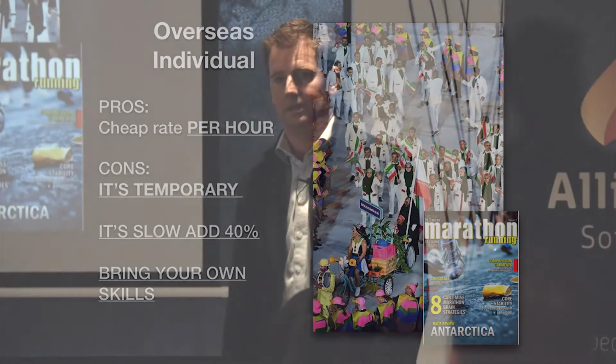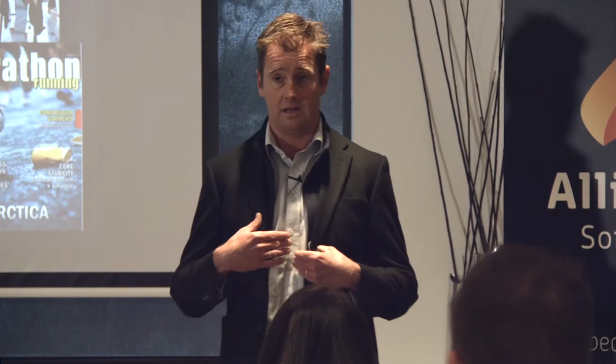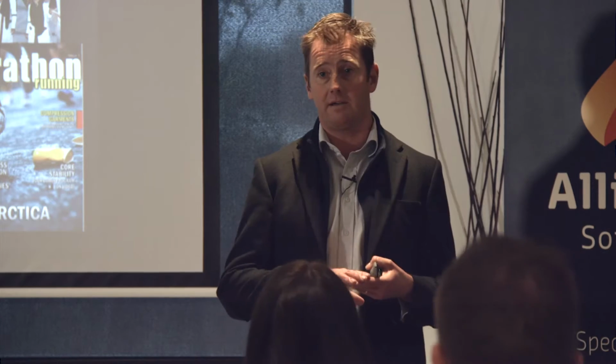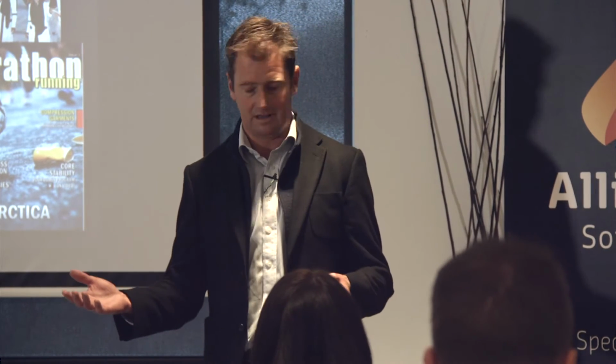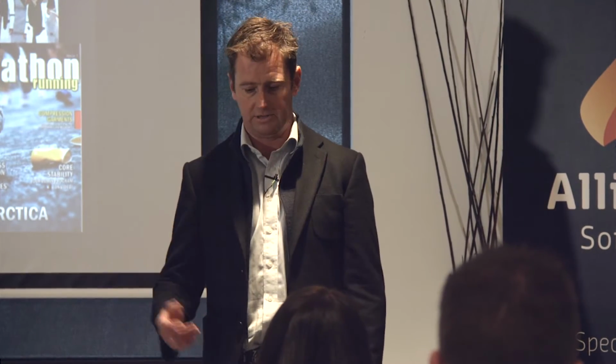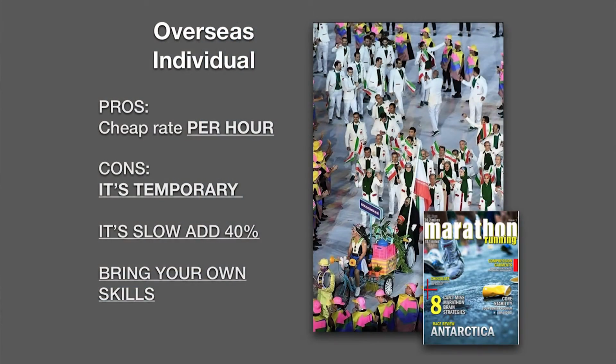It's also slow. It's extremely slow, and this is what everyone faces in overseas development, whether you do it at the level that I have, when you're talking a few hundred dollars for a development, versus millions of dollars. It's a slow process. You're trying to overcome language barriers, and the interpretation of the specifications, and generally they're just producing slow code. So the project on average would probably take 40% longer than if you're developing with a local developer.